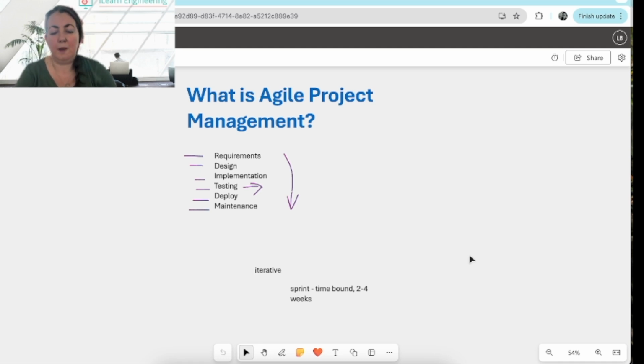So now, by the end of sprint three, you can log in, pick your driver, pick your car. Sprint four might be creating a certain type of racetrack. Sprint five might be a different racetrack. Sprint six might be the point system and so on. So we slowly build up the software in these little chunks, in these iterations that are called sprints. And that's how Agile works.